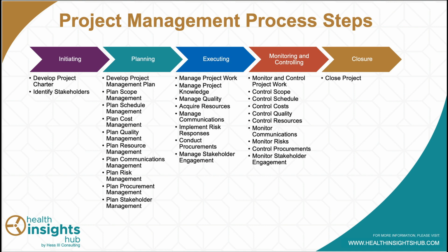In the planning phase, this is also known as due diligence, and it is really essential to setting your project up for success. And so in the planning phase, this is where we start to see those knowledge areas get folded in. And we're going to first start off with developing a project management plan, which is not what most people consider that to be. This is not your activities list. The project management plan are the rules of the road, your policies and procedures for how you intend to manage your project.